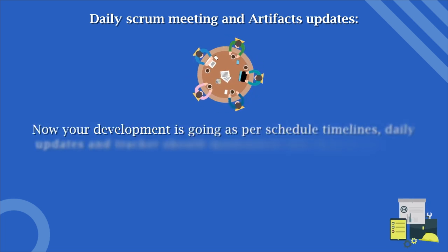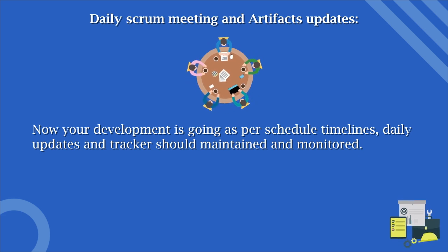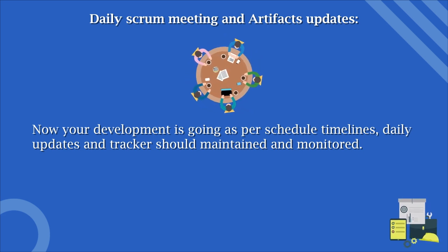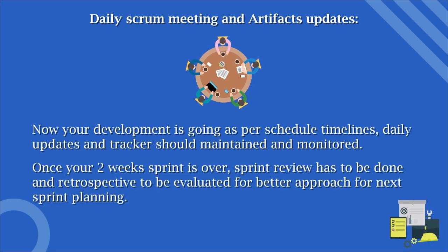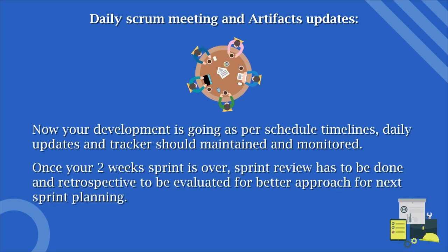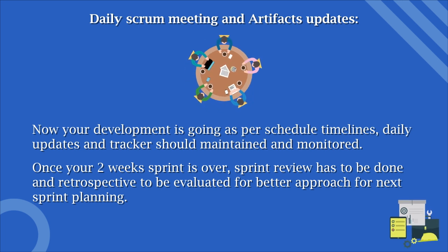Now your development is going as per your scheduled timelines. Daily updates and trackers should be maintained and monitored. Once your 2-week sprint is over, the sprint review has to be done and the retrospective evaluated for a better approach in the next sprint planning.